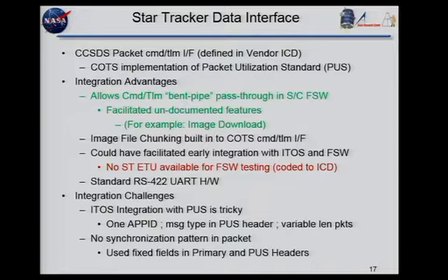One of the lessons learned was that the program decided not to purchase an ETU because it was kind of expensive. So all the coding done for this and the database development was done against a PDF file that described the interface.